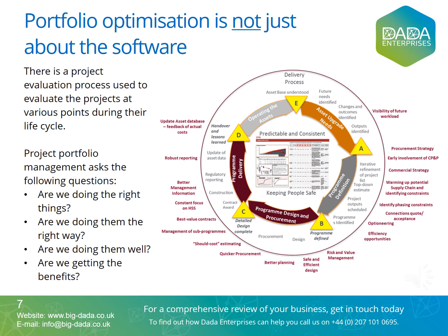And so, any reporting solution needs to be supported by business processes. It requires that there is a project evaluation process used to evaluate the projects at various points during their life cycle to check if it is failing and whether it is still able to achieve the portfolio's objectives. Frequently, companies use consulting diagnosis frameworks to do this, like SWOT, Boston Consulting Group matrix and PESTLE analysis, to firstly shape their portfolio.